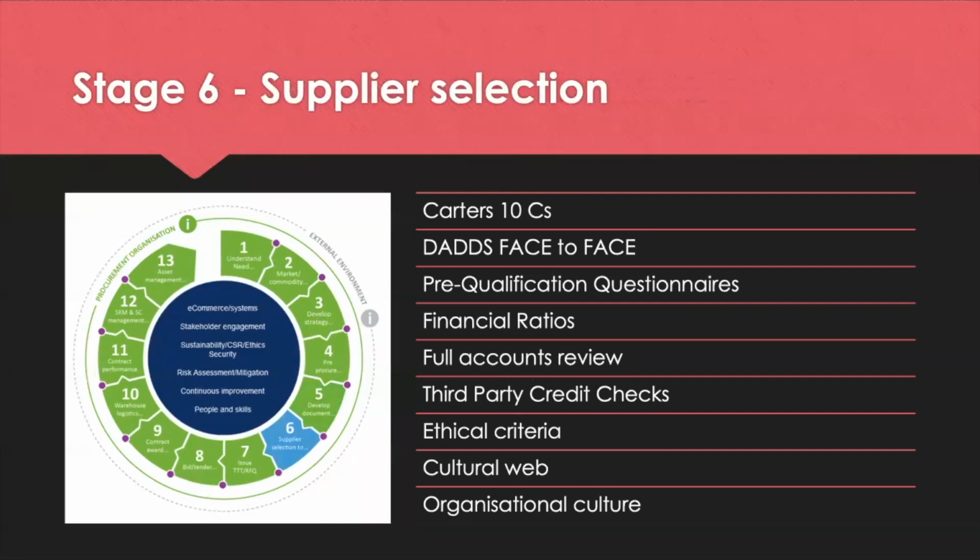So moving on to stage 6, now we're at the supplier selection stage, and here information is ammunition. Conducting RFIs at this stage in the cycle can really help you to gain insights into suppliers' sizes, capabilities, finances, strengths and weaknesses. You do all of this before deciding whether or not you should include them in the tender process.